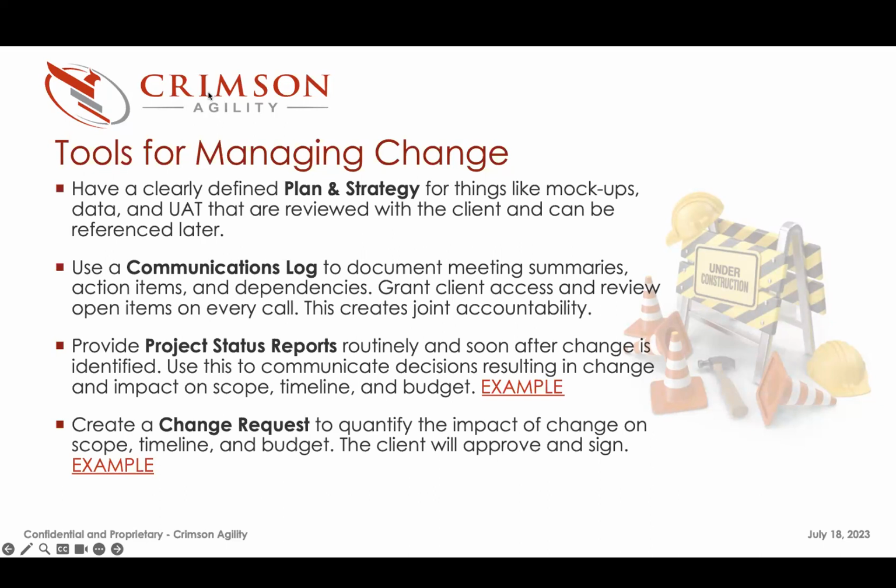When you're dealing with third parties, when I talk about the plan and strategy, I'll tell the client, hey, Folio 3 is doing the integration. We're there to provide some guidance, support, troubleshooting, and validation. And we've allocated, let's say, 15 hours to do that for them. It's very easy to track how much interaction, how many meetings, how much time we've spent supporting them.